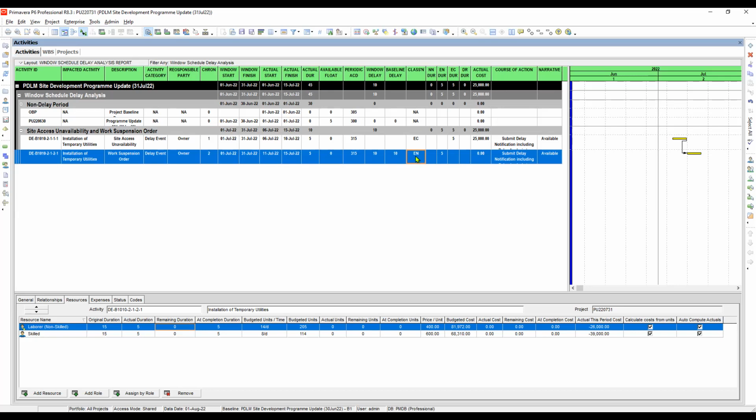But since the contractor also sought to mitigate the cost impact of the delay, they decided to utilize their workforce in other areas during this period of 5 days delay. So they didn't incur any cost due to the delay. But the delay on the duration is excusable for the contractor.